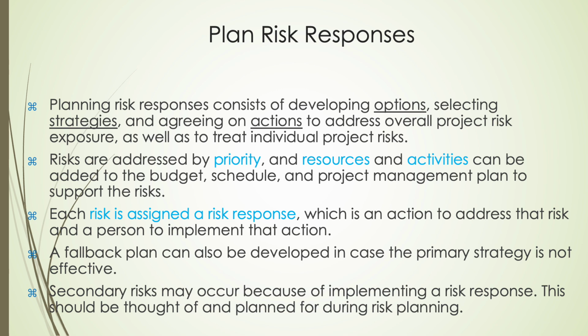The risk management process involves identifying potential risks across key organizational elements, assessing their impact and probability, and calculating a priority score to focus mitigation efforts. Risks such as material delays, machinery breakdowns, labor shortages, excessive procurement costs, and schedule delays are evaluated and ranked based on severity using a color-coded system. Each risk is then assigned a specific response strategy to either reduce the threat or enhance opportunities, depending on its nature and criticality.